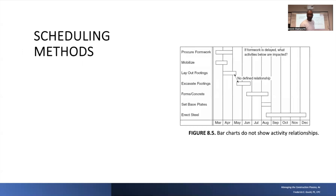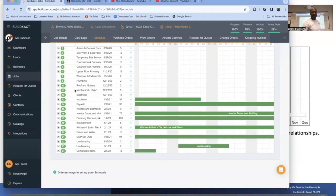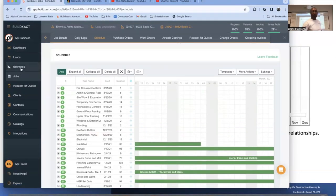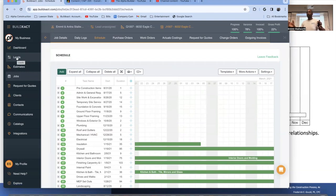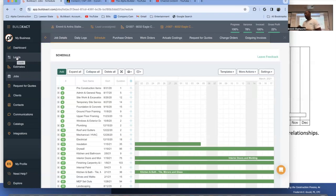Bar charts do not show activity relationships. For example, you can't schedule the roof being put on if the framing hasn't been done. There's a dependency relationship: the roof has to come after the framing. That relationship is what network-based scheduling methods capture.